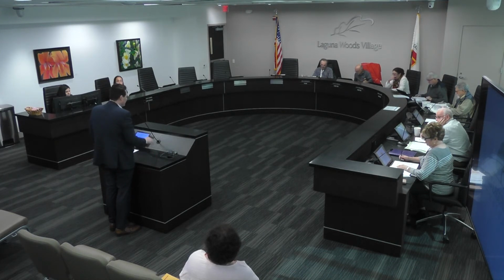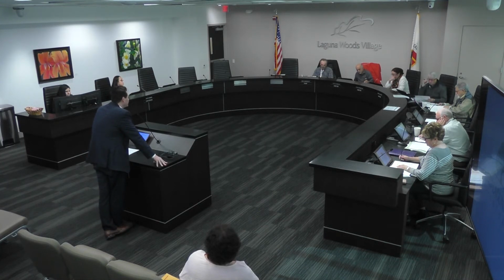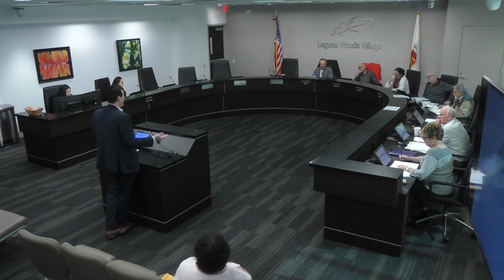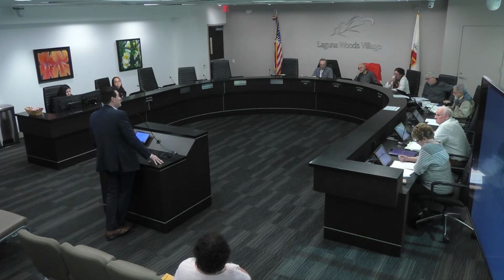So we did look at the expenditures from past years to help guide us in this decision. Originally, an analyst sat down and counted how many buildings and decided that a certain percentage of these buildings may need attention, may need some repair work. So it's really a guesstimate, and it was done by an analyst way back when. So we keep that as a contingency. If it's not spent, it goes back into the reserves. But we never know how many of these incidents are going to take place.